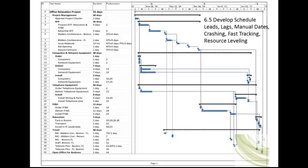Project managers typically respond to all vendors with a document called an addenda. In our example, the project manager will issue an addenda four days after the Boston bid conference and three days after the Florida bid conference. The addenda lags the bidders conferences by three and four days, respectively.